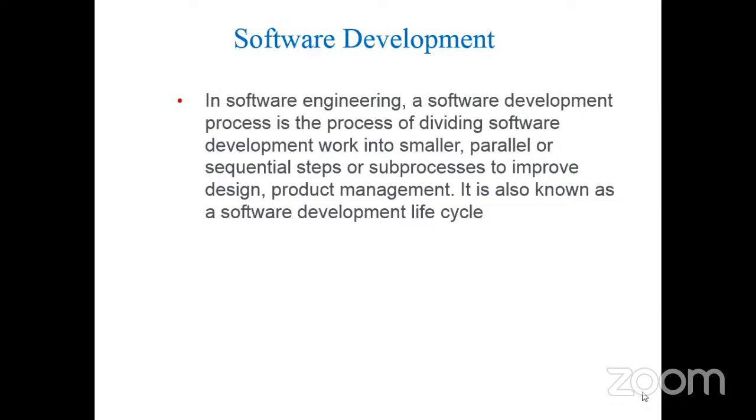which is given by a customer. So how do you visualize that project? If you visualize that project as a group of modules, like for example an admin module, or a reporting module, or a business processing module, or some other module, you cannot execute all the modules at one stretch every time. That means you need to sub-modularize them. This is what is called disintegrating the activities. This is also called chunking the activities.